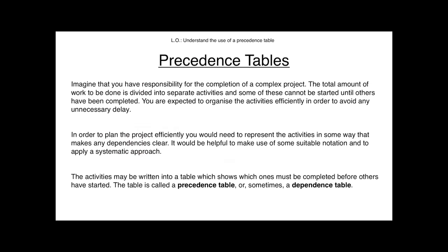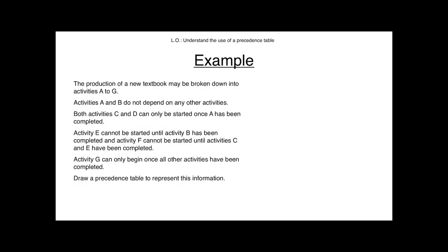You cannot mix the egg in the cup before having cracked the egg. So the activity mixing egg depends on activity cracking egg. Activity frying egg depends on having completed activity mixing egg, if we stick to my omelette example. That's basically all that this means.